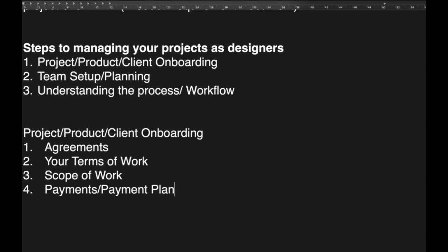Okay, so the thing I'm trying to point at here is the scope, because this is very important, and also the payment plan. So when working on the scope, they started talking about things like very complex branding. They started mentioning making sure that the brand design also contain merchandise design for scarves, t-shirts, pen, mugs, and we're like, come on, this is beyond the initial scope, because if we knew you wanted this set of features on your brand, then definitely you would even be paying more than $2,000 on just the brand design, right?